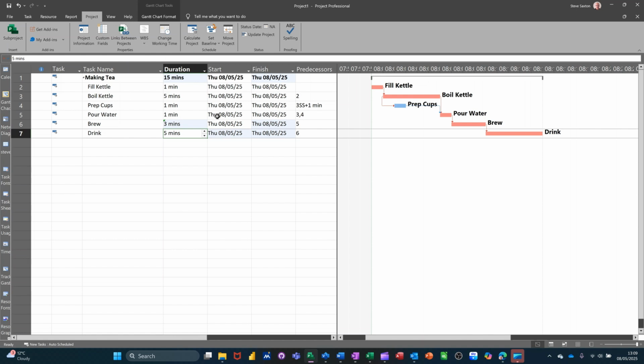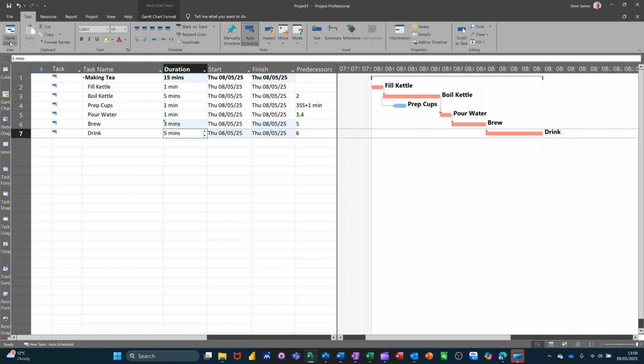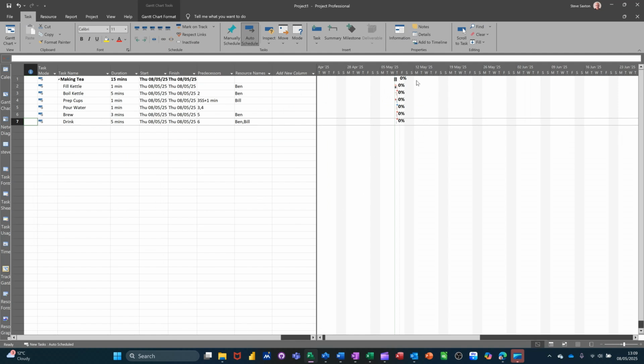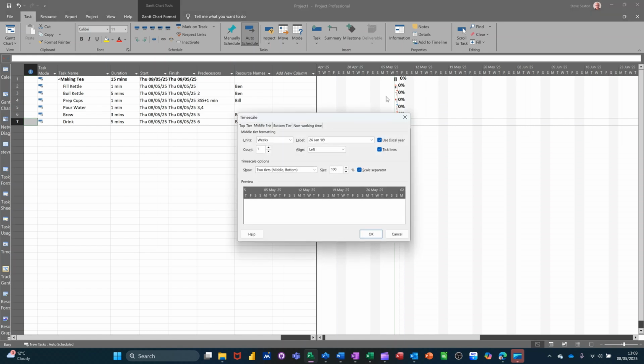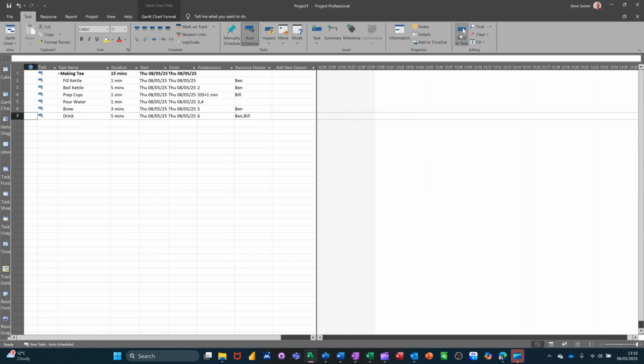And then you can see, if you go to a different view, like the tracking Gantt view or something like that, you can see any changes that there might be in this. So I'll go up here and do it. If I go to the Gantt chart, go to tracking Gantt, you'll see any movement on there. Now the timeline is still the same, so I'll need to double click onto that to set that back to 1 tier, and also do that to minutes. And you'd have to do that for every one that you decided to utilize, whatever timeline you've set. Scroll to task, brings that back in, and any movement from the baseline that you saved will be shown there.